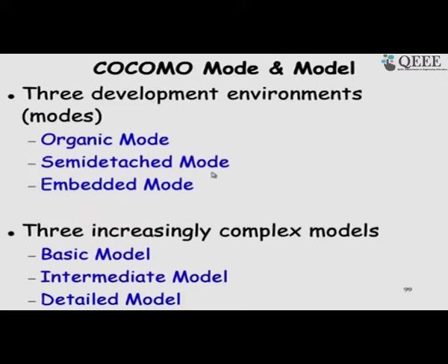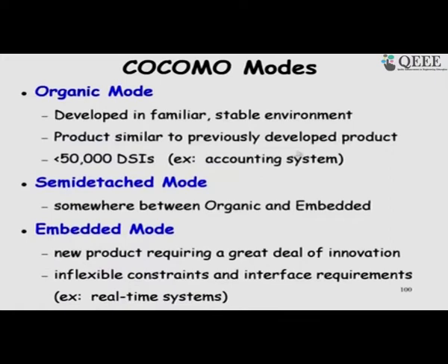And to classify the software that is being developed, some software is very complex, some is moderate and some is very simple. So, he proposed to classify software into 3 types: organic, which is easily developed; semi-detached, medium; and embedded, which is complex. He also said that even if it is simple software, if it is being developed by a very inexperienced person without using any process and tools, that may become very complex for them, and we have to consider that as embedded software.